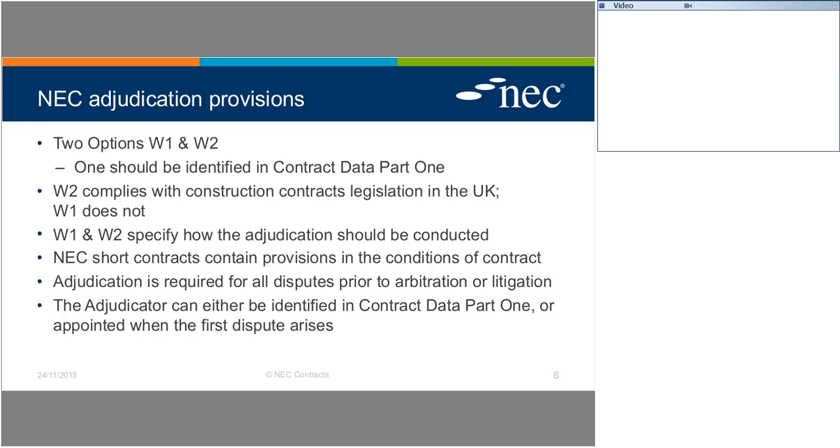There is a table in W1 that details the types of disputes that employer and contractor may have, and restricts the time period for bringing those disputes. It's consistent with all of the other provisions of NEC contracts, which are designed to deal with issues at the time they arise and not put them off for another day much later on.